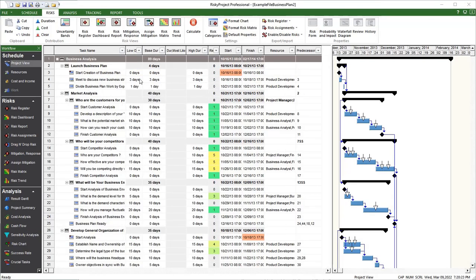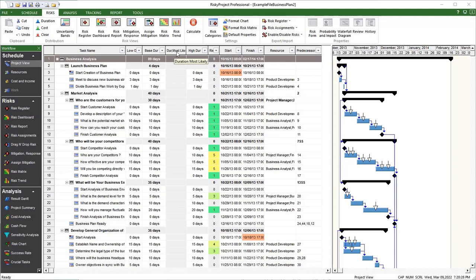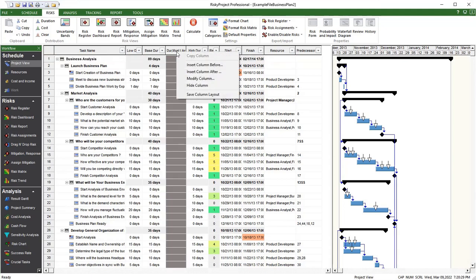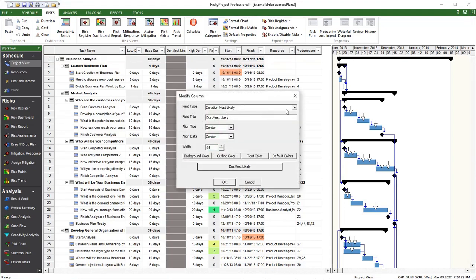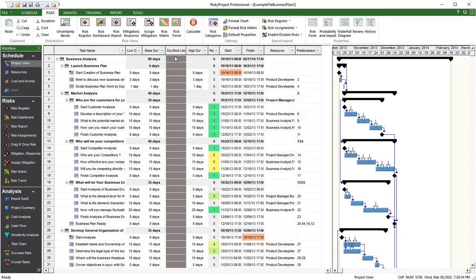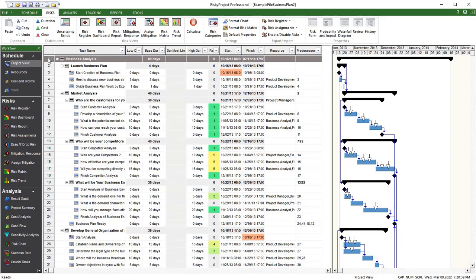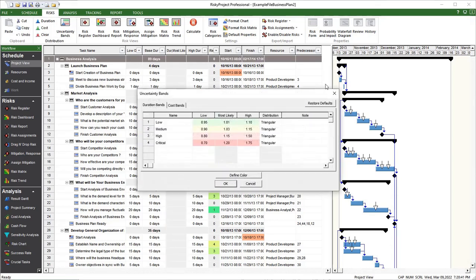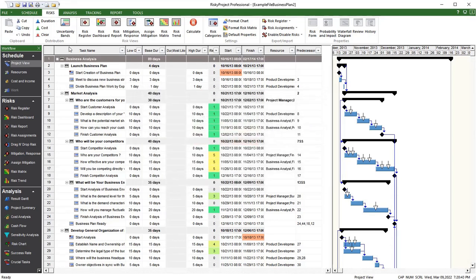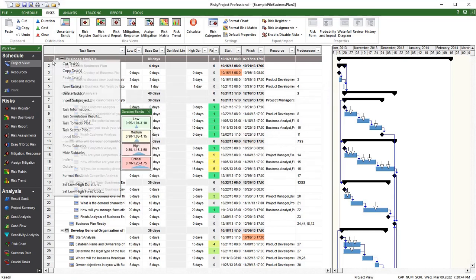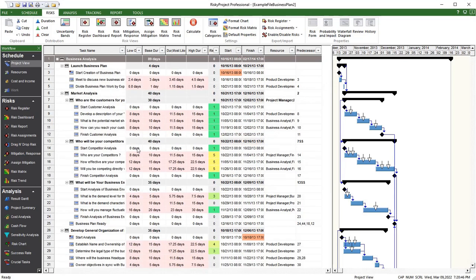Along with low and high values for duration and fixed costs, you can now define most likely values. While base duration and fixed costs are deterministic values from the original project schedule, most likely duration and fixed costs are distribution parameters. Most likely values for duration or fixed costs can be imported from schedules or applied using uncertainty bands or the set low-high dialogue boxes.